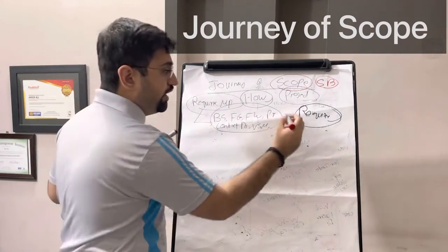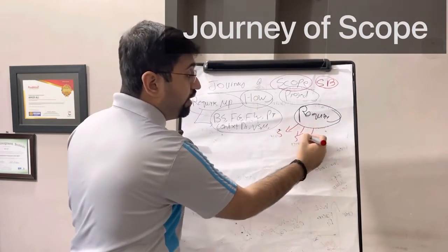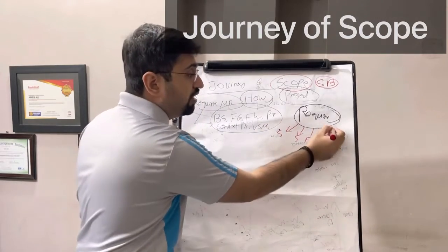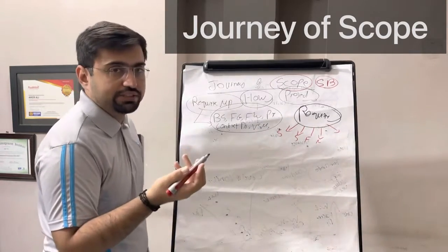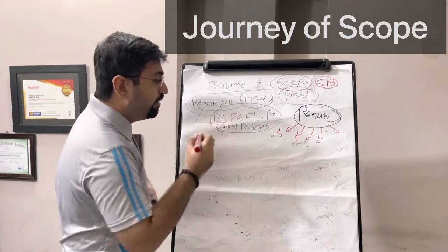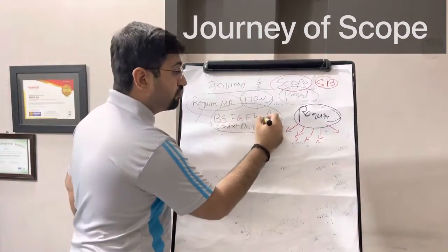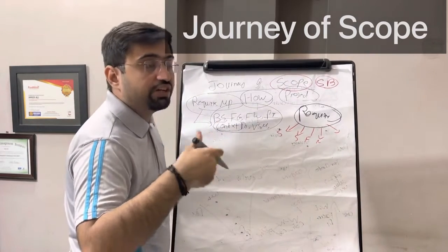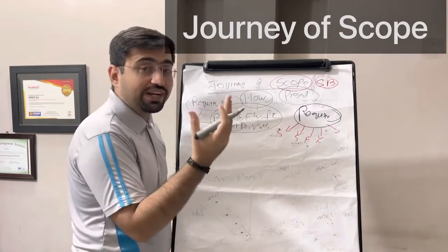A requirement can be a stakeholder requirement, a solution requirement, a functional requirement, things that must be present in the project, a non-functional requirement, a transition requirement. All those types of requirements are there. So we capture all those requirements utilizing techniques such as brainstorming, focus group, facilitated workshop, prototyping, context diagram, Delphi technique, value stream mapping. The purpose is, whatever you do, you collect the requirements.